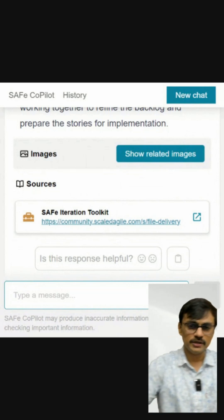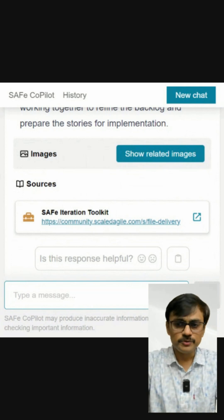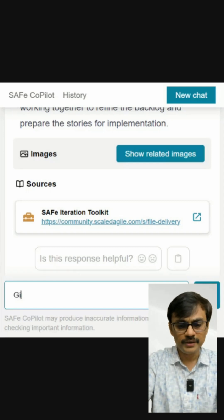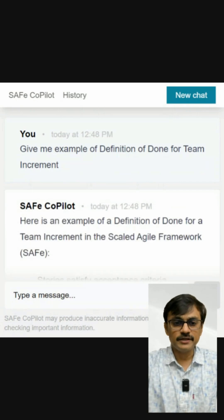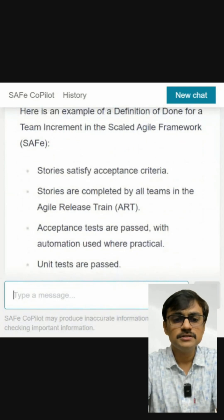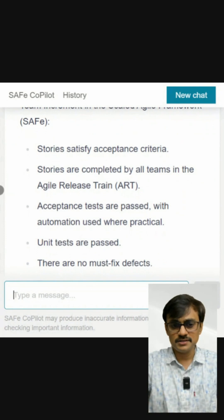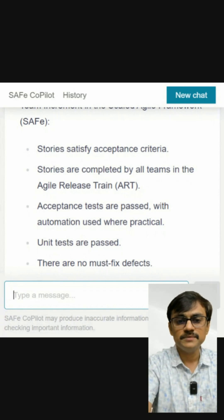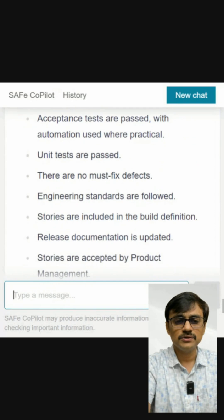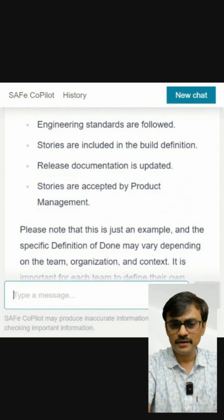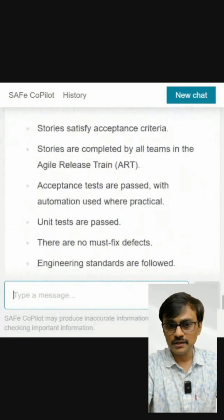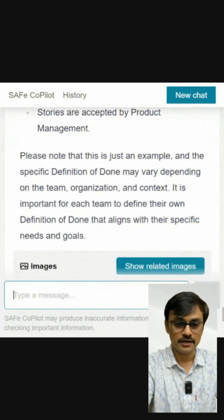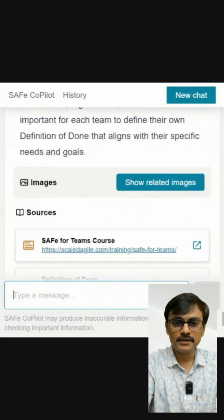This is something you can use day to day, but you need to be a little careful as well. For example, I asked: give me an example of a definition of done for a team increment. The response included 'stories are completed by all teams in the agile release train,' which is a little weird — and 'stories are accepted by product management,' which is incorrect; stories should be accepted by the Product Owner. So there can be errors like this. SAFe reminds you not to use it for multiple-choice exam questions, and it's also risky for that reason. It is a decent brainstorming tool, but errors can occur.